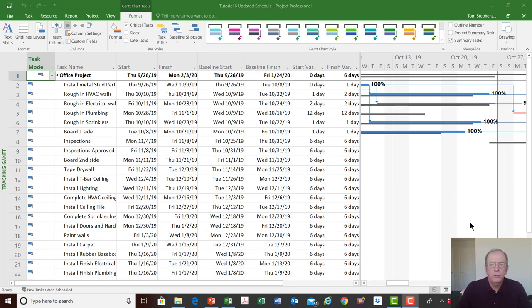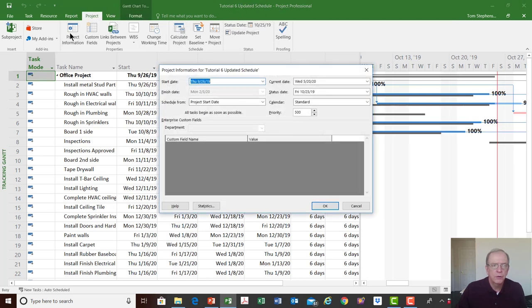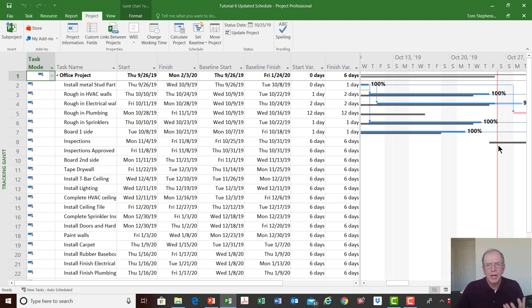As a quick review, key points to updating a project: we have to have a status date. The status date can be entered from the project tab or through project information. The status date is the date you are updating the schedule to, so it should be at least this date or within a few days. You want to update it as close to the time period as possible because your information is more fresh and accurate.